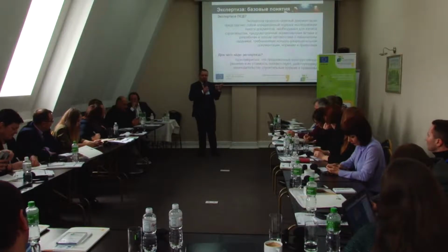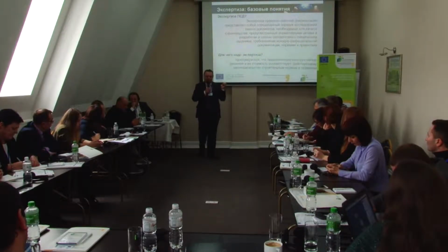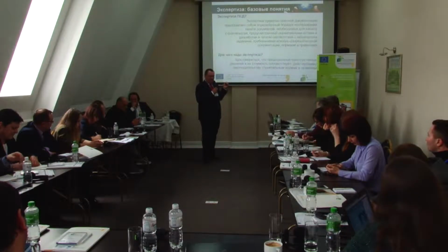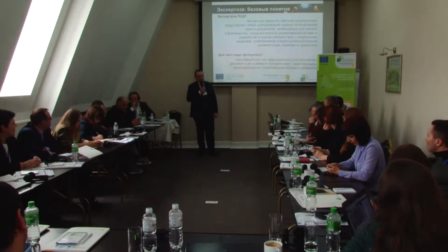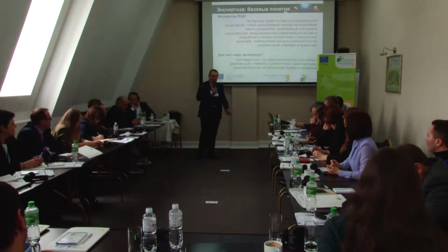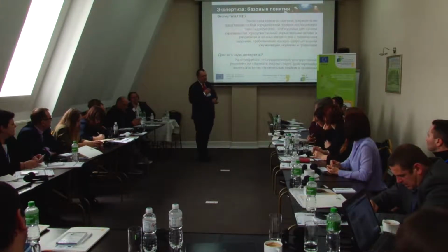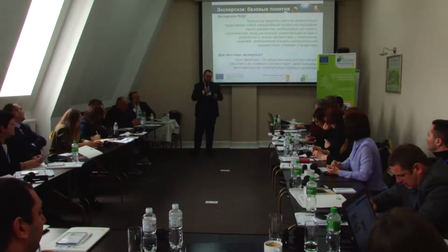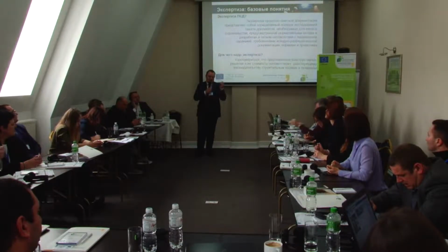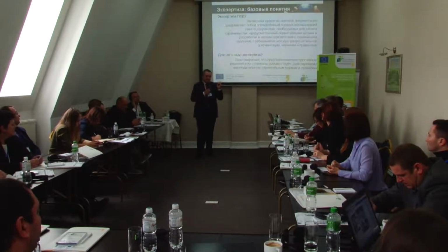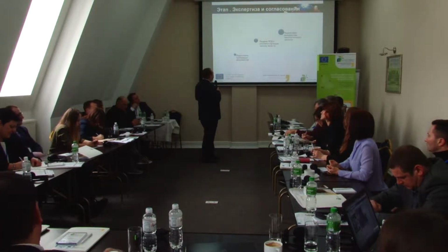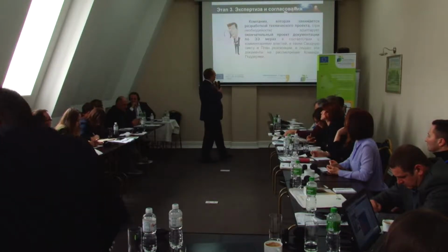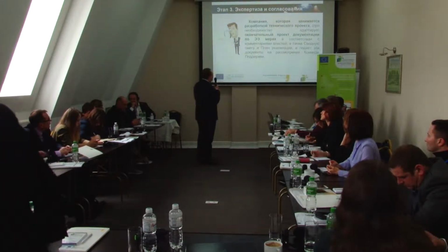of the budget. So after the procurement, the price cannot be higher than the bill of quantities developed by the developers and verified during the examination process. Well, actually, in Ukraine, the cost of the facility or the object after the procurement cannot be higher than the budget included into examination, because the examination has already shown you the maximum cost of your project or your object.